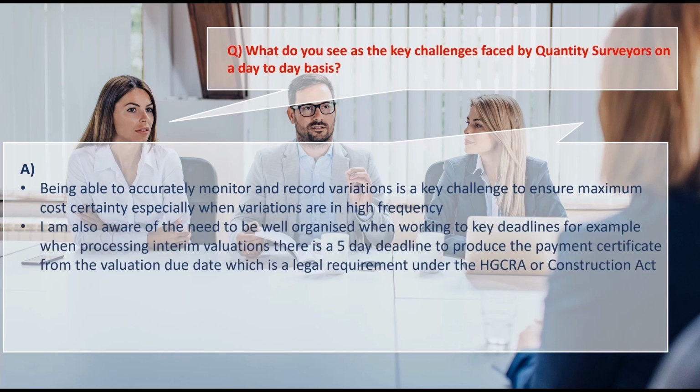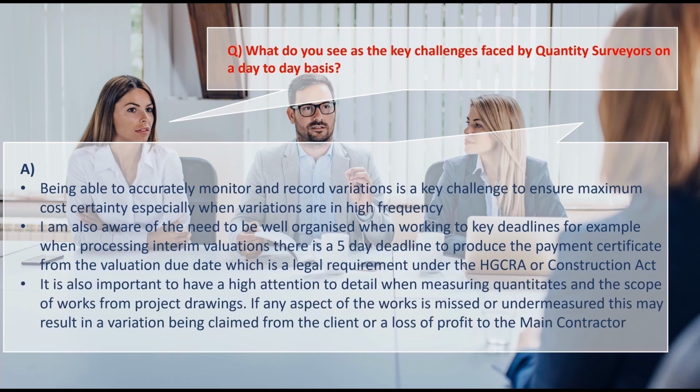We can also say that we're aware of the need to be well organised when working to key deadlines. For example, when processing interim valuations, there is a 5-day deadline to produce the payment certificate from the valuation due date, and this is a legal requirement under the Housing Grants, Construction and Regeneration Act or Construction Act. Finally, we could also say that it's very important to have a high attention to detail when measuring quantities and the scope of works from project drawings.